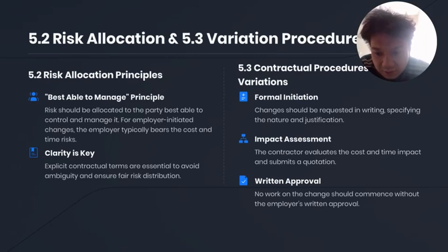Changes should be recorded in writing, assessed for time and cost impact, and pricing should use agreed evaluation methods in advance. If these steps are skipped, conflict escalates, and additional management, negotiation and dispute resolution costs increase the total project cost.